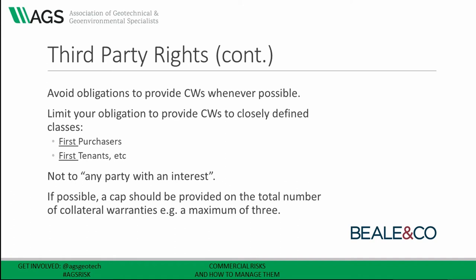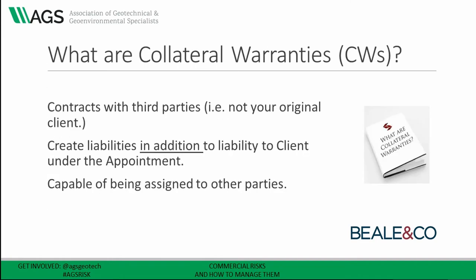Now let's take a look at contracts with third parties. These can take a number of forms, but let's start with collateral warranties, which is the most formal. A collateral warranty is a contract where you warrant to a third party — i.e. someone other than the original client — that you've complied with the terms of your original appointment contract. Collateral warranties are used to create direct contractual links between yourselves and third parties, without which those third parties would be unable to recover any economic loss, such as loss of rent. It also means that if your original employer goes bust, they can sue you directly.